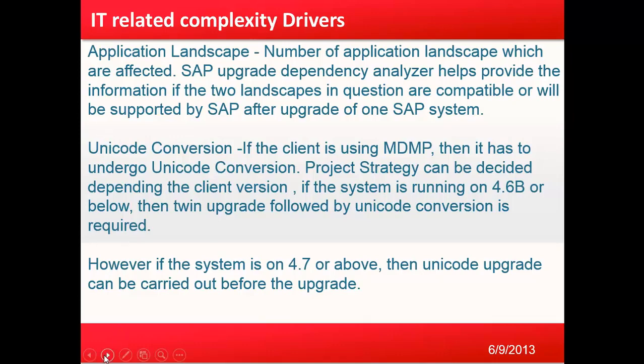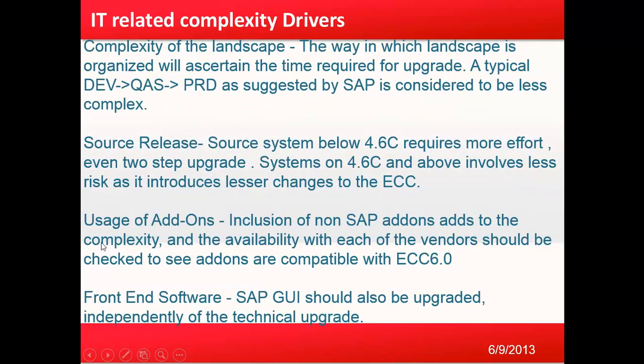The complexity of the landscape — the way in which the landscape is organized — will determine the time required for the upgrade. A typical SAP landscape of Dev to QA to Prod, as suggested by SAP, is considered less complex. Regarding source release, a source release below 4.6C requires more effort and even a two-step upgrade, while systems on 4.6C and above involve less risk as they introduce fewer changes to the ECC system.